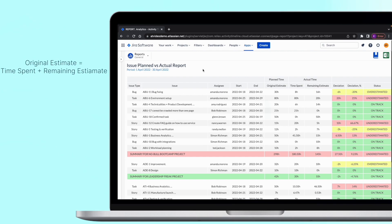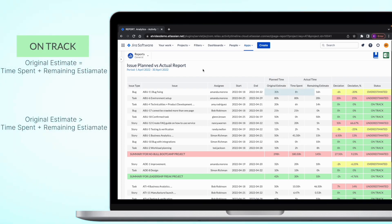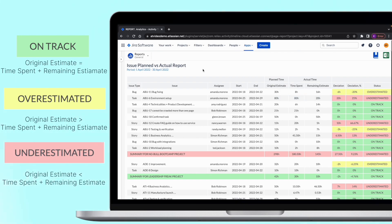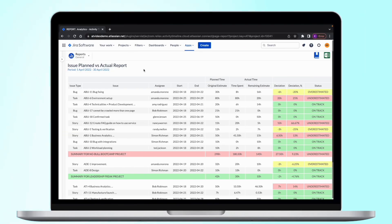In the ideal world, original estimate equals the time spent plus remaining estimate. And in this case, the task is on track. But if original estimate is greater than the time spent and time remaining, it would make this task overestimated initially. And vice versa, if the planned time is smaller than the actual, the task was underestimated. You can also see the summary for that project as well as its deviation from the initial estimate.